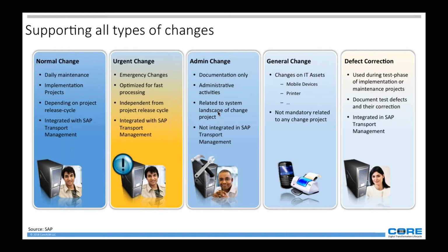There's a 6th, which is a standard type SAP introduced in SP6. Let's imagine you have a list of 50 types of objects in your environment that are okay to move to production without that level of granular approval, right? You don't need to go to a CAB review to get those deployed into production, because they're minor changes or pre-approved changes, basis types of changes that can go to production faster.